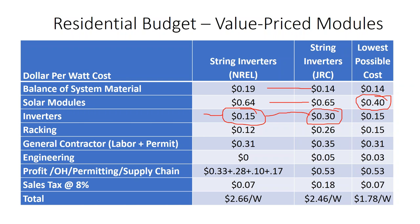But guess what? It's as expensive as the SolarEdge DC optimizer system, because it's a very robust string inverter. So there is a pricing gradient on your inverter systems. Generally, I'll budget around 30 cents a watt for either my high-end string inverter or DC optimizer system. The microinverters can be a little bit pricier than that, especially when you're putting them on every module. But then again, you can go and find cheaper and lower-end string inverters.